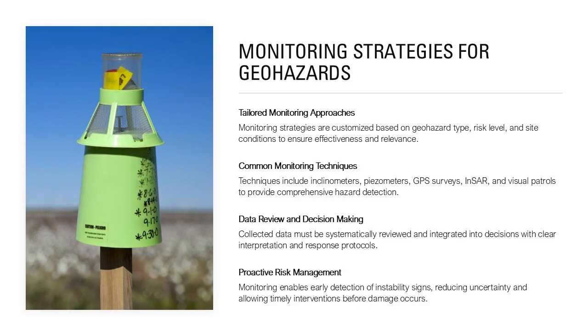Common monitoring methods include slope inclinometers, extensometers, piezometers, strain gauges, GPS surveys, NSAR, and visual patrols. The selection of monitoring tools should consider reliability, data resolution, maintenance requirements, and response time. Trigger thresholds should be established to define when further investigation or mitigation is required.